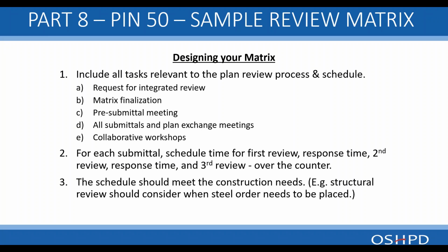For each submittal, schedule time for first review, response time, second review, response time, and third review, wrapping up with an over-the-counter. We recommend third review wrapping up over the counter. Usually design teams are optimistic and only plan for 1 or 2 back checks, and we find sometimes that it goes over and then the schedule is off.